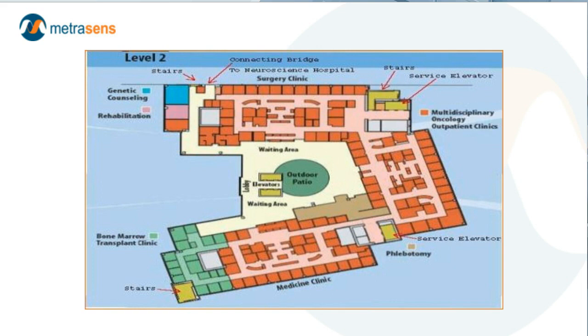Subsequently, hundreds of thousands of dollars were spent retrofitting this to help provide a reasonable amount of security. This is one where the keys were being issued, and the clinic managers were not happy at all with their design. It was a beautiful, fantastic looking facility, but in practical reality, they had to go lock every patient room, every exam room, until we had an alternative security plan in place. That after spending hundreds of thousands of dollars renovating.